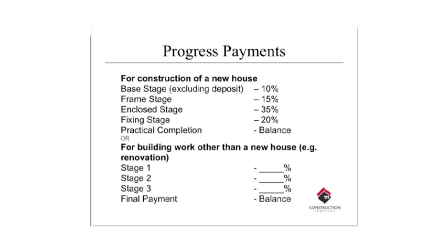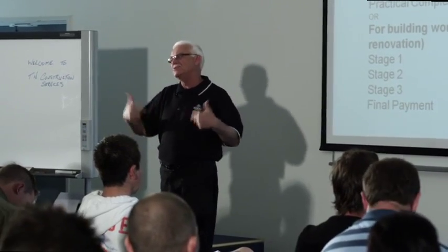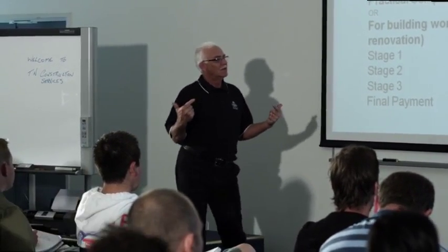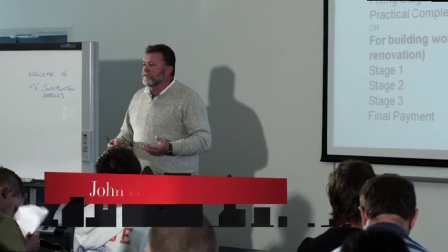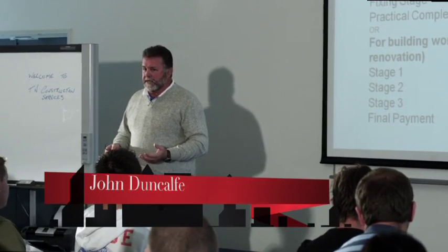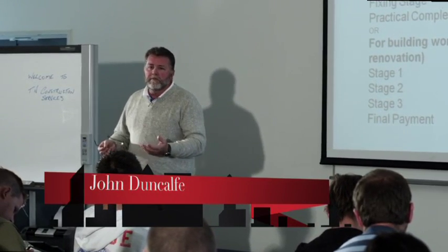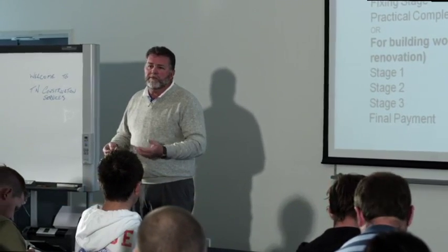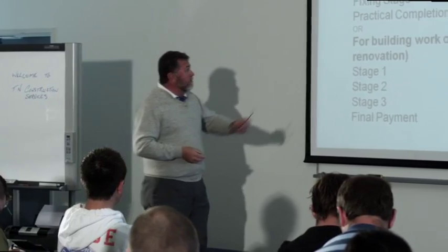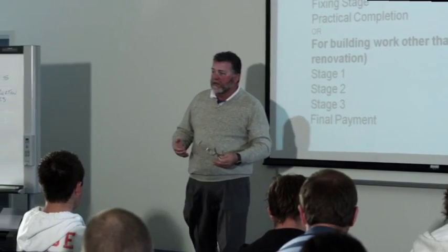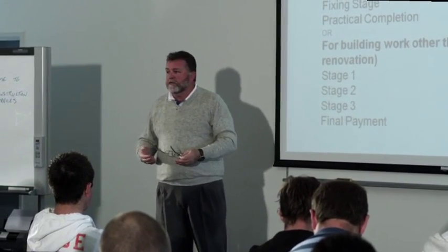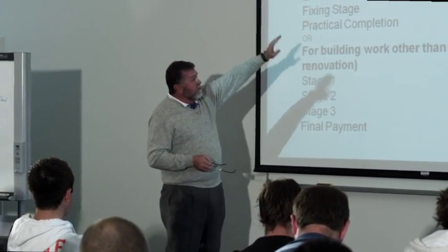So I'd like John to go through the different methods of how you're going to get paid as you go through the contract. Okay. Progress payments. As Paul said earlier, progress payments are already prescribed under the Domestic Building Contracts Act. It is not something the BSA, the HIA, or the Master Builders made up. Remember, the deposit is fixed at 5%. You can't take more than that. When you get the base stage down, you've got a 10% payment.